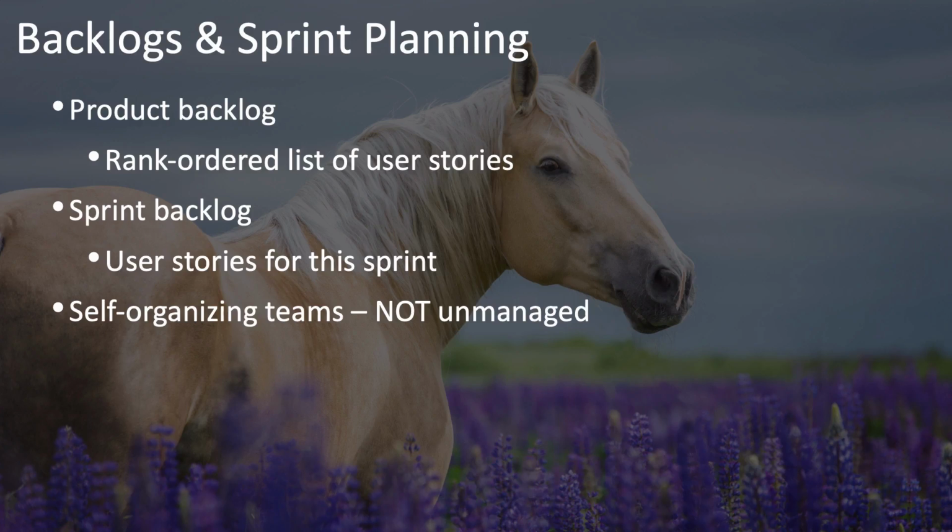The sprint planning meeting is a meeting of all of the project team members. It's the meeting in which the team selects the items from the top of the product backlog that they'll complete in the current sprint. If an item is too large to complete in one sprint, then it should be split into subtasks that will fit into a sprint.